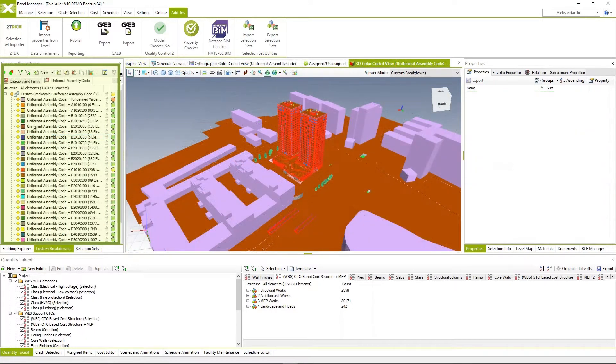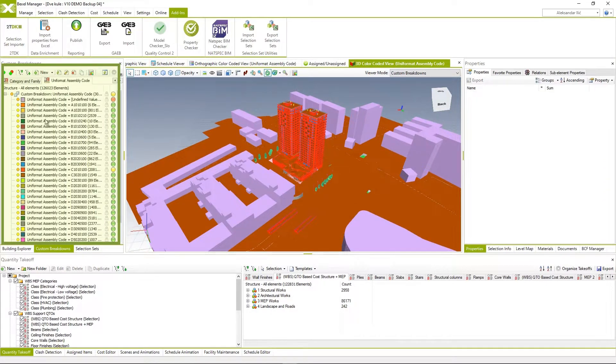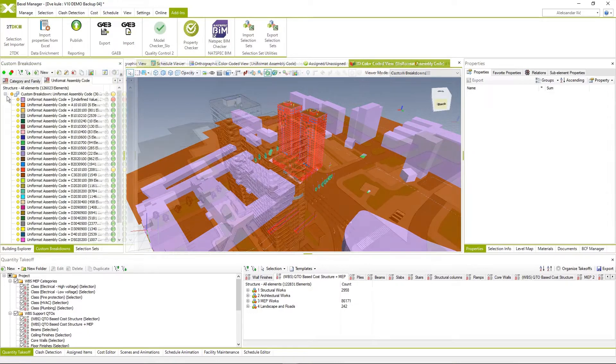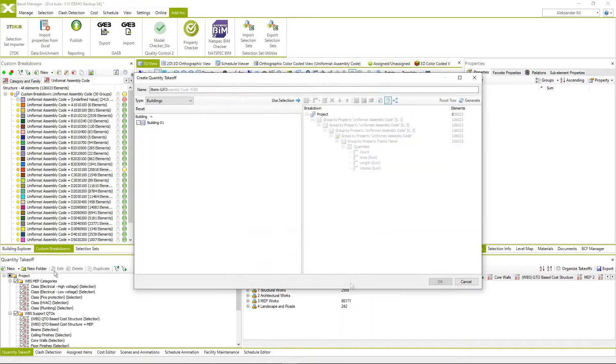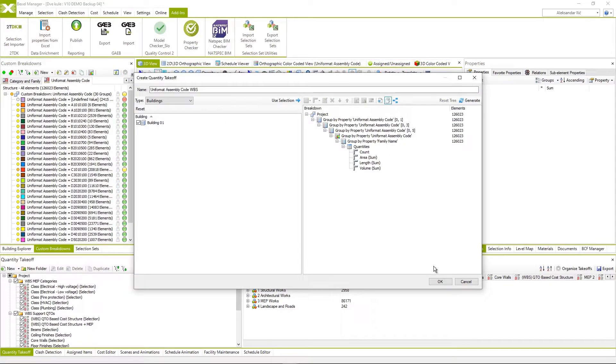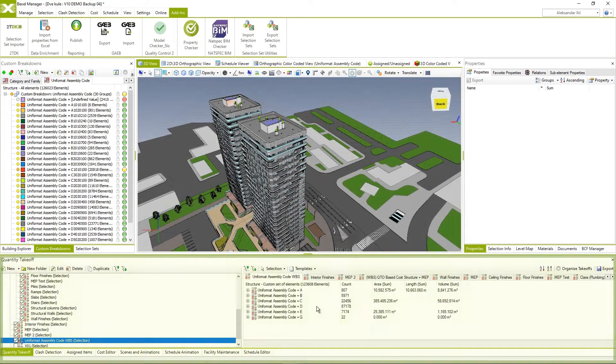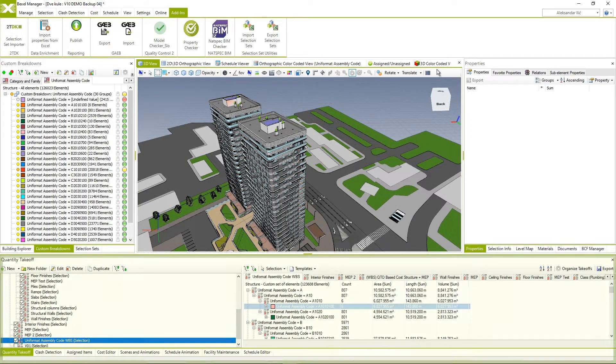Visualize and analyze project data using color coding breakdown structures on BIM elements in the model. Create or import quantity takeoff and generate work breakdown structure for cost classification using BIM element data.